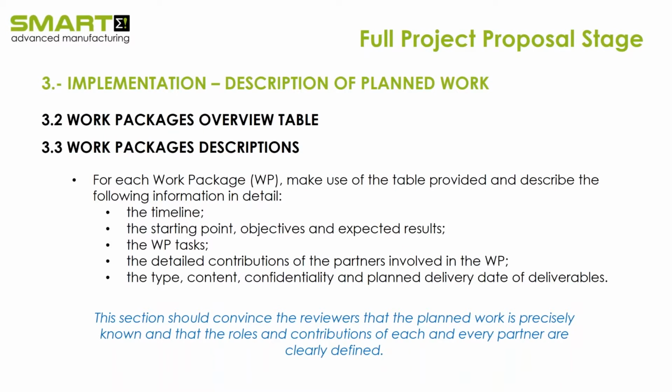And then come the work package descriptions. First, there is a work package overview table with the title of the work package, the number of person months, and the duration of the work package. It's quite simple. But then comes the work package description, and for each work package you will have to make use of a table. It's a template I will show later, in which you have to explain the timeline, the starting point, the main objectives of the work package, the expected results, which tasks are identified inside the work package, and also the main contributions from the partners involved.